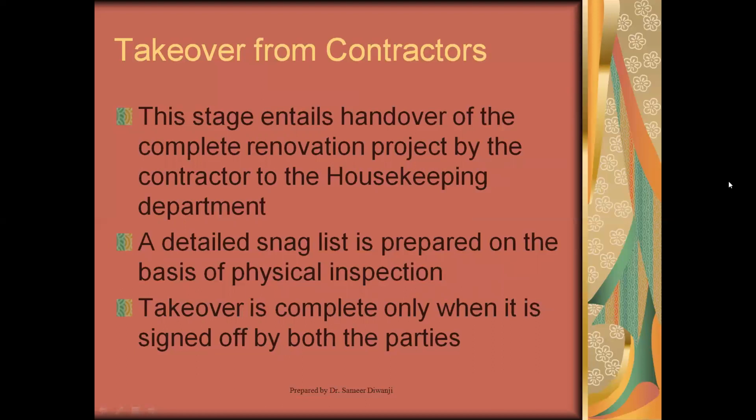It's up to you, and now where you have employed people or contract or projects team, you take over from them. So this stage entails handover of the complete refurbishment project by the contractor or the project team to the housekeeping department. Here is when the detailed snagging comes in also.